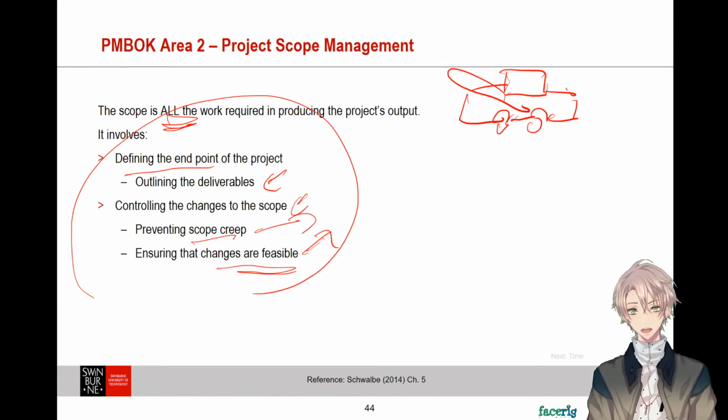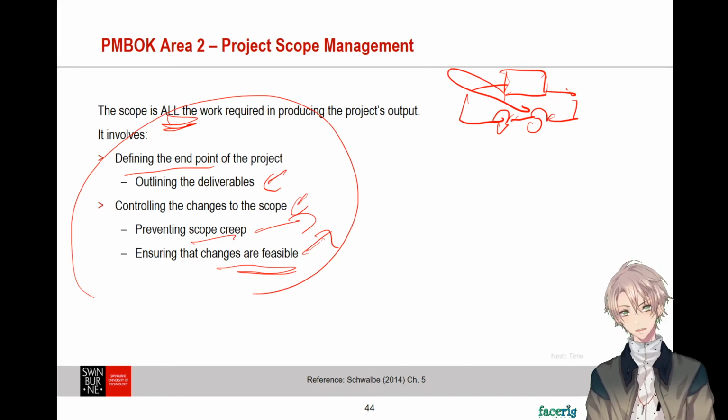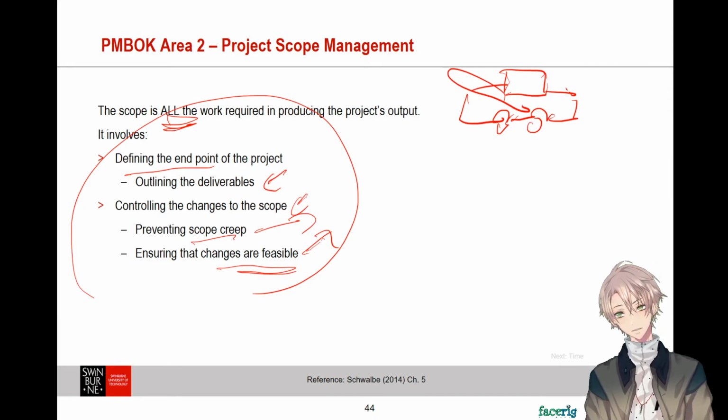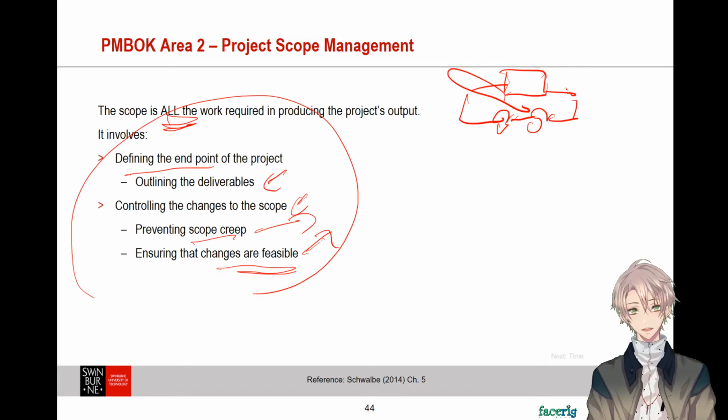If not, the client doesn't want to accept the project because you didn't define the scope correctly. You have to do that. If not, the client will not pay you. But if you already defined the scope earlier that you will not do this kind of changes, then your client cannot say anything and still pays you the money. That's why scope management is important, to ensure that any changes are ones that you can change. Maybe add something like the first change is 50 ringgit or something, and so on.